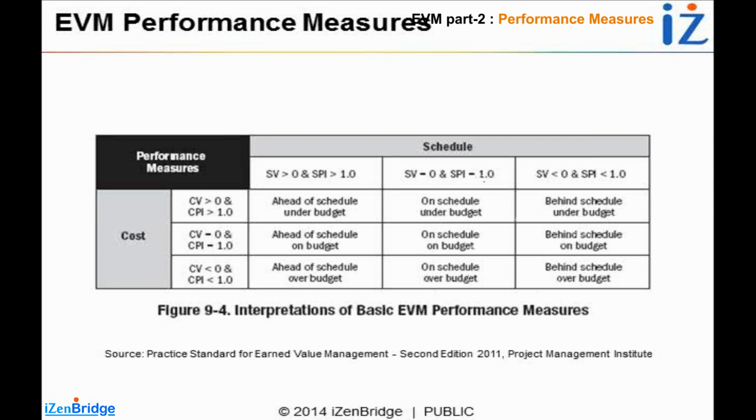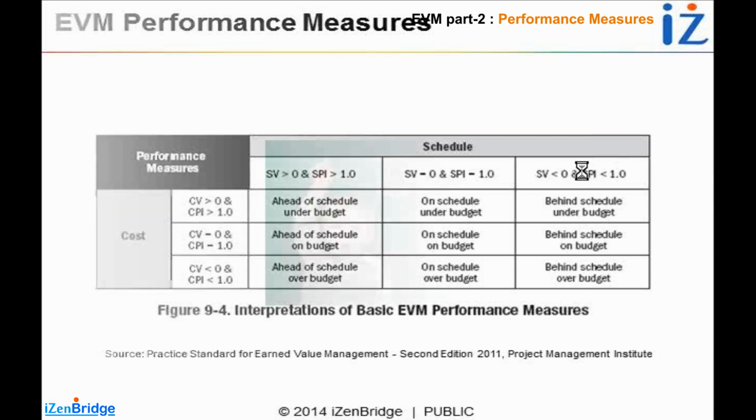Now you may wonder, what if you want to make some sense of project progress in the time dimension? How do we do it if SPI cannot help? We need to add reports which are linked with the critical path method, or whatever scheduling tool is used in a project, in order to get a time-based indicator or a time-based sense of our project.